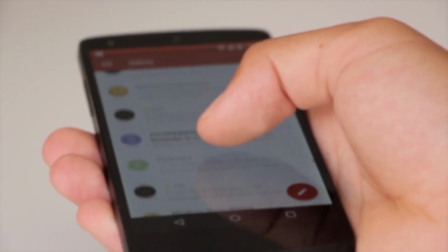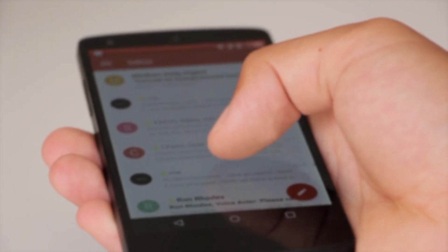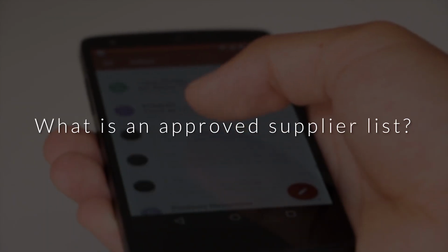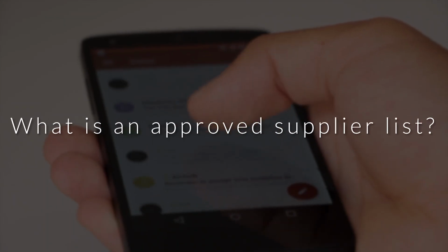It's an equivalent of creating a framework agreement and then you're just saying, look, we told you at some point you're going to get 30 of these things, now just supply those things. So, it's saving them time. And they could be dealing with a supplier who is in an approved list. So the question then becomes, what is an approved supplier list? Think of it this way. You can go into the market, start looking for fresh suppliers every time you want to buy something. Or you can just vet your suppliers and add them to a given list. Put them in a list.